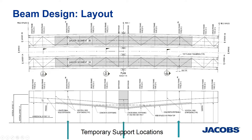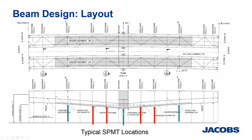The erection process involved bringing one steel segment, placing it over temporary supports, then adding additional segments and splicing. After the bridge was complete, the SPMT would squeeze in between the temporary supports, pick up the bridge, and take it to its final location. Every time a steel segment was placed in the field on temporary supports, that was captured in the MIDAS model — and as the deck was cast, we captured the locked-in stresses on the structure.